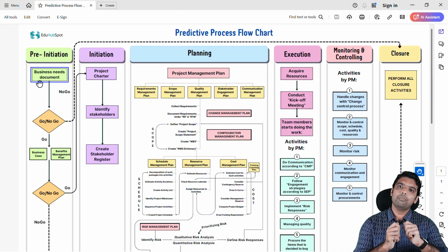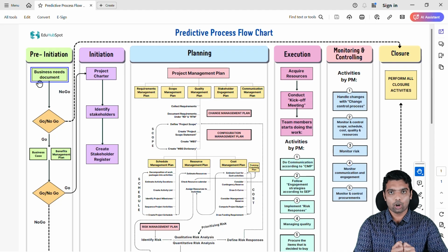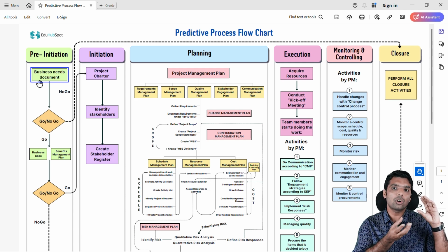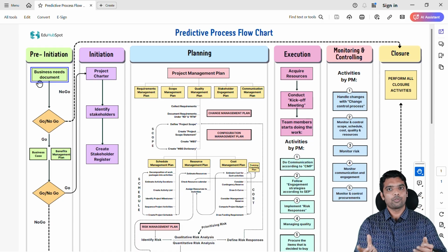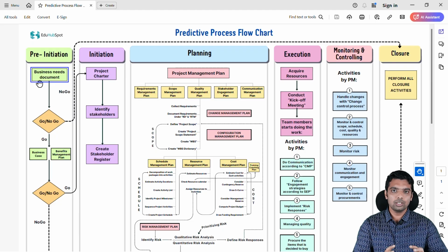Now, at the time of the sponsor creating the needs document, the sponsor will do an analysis called needs analysis. What is needs analysis? The sponsor will take the organization's goals and then analyze whether this project will really contribute to the goals of the company or not. Now let's take our apartment construction project. Definitely, when you're constructing an apartment, you will be working in a construction company. Consider your company's goal is that within 2030, your company has to be an X dollar revenue generation company.